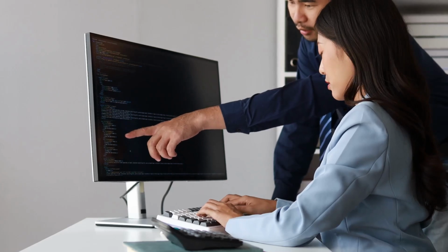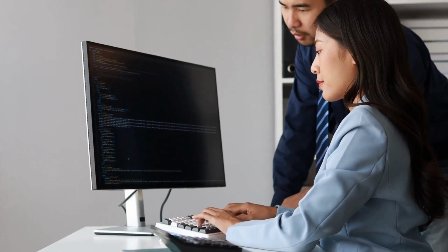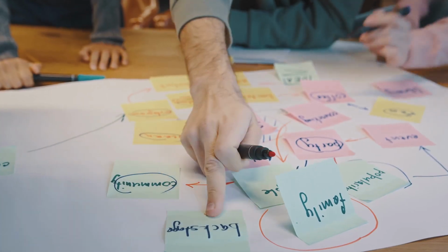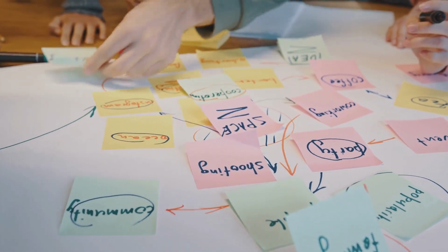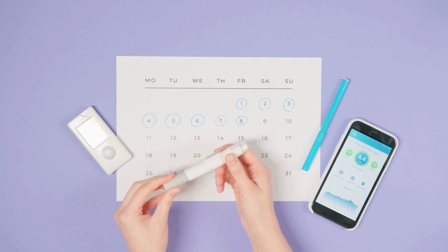Lead time refers to the total time taken from the moment a customer or stakeholder requests a new feature, bug fix, or improvement to the moment it is released and available for use in production. It includes every step in the process: time spent in the product backlog waiting to be prioritized, time taken for analysis, planning, development, testing, approval, and deployment. Essentially, lead time reflects the entire duration of the customer's wait, regardless of whether work has actually started. For example, if a request is made on January 1st but is not released until January 30th, the lead time is 30 days, even if the actual work only took 10 days.